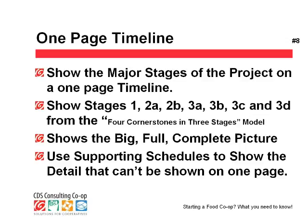A one-page timeline shows the big picture, the full picture, the complete picture. You use supporting schedules to show the detail that can't fit on one page. Sometimes people work with Gantt charts, which can be very effective, but they're hard to fit on one page. I encourage you to think about and try to work with the one-page version as well.